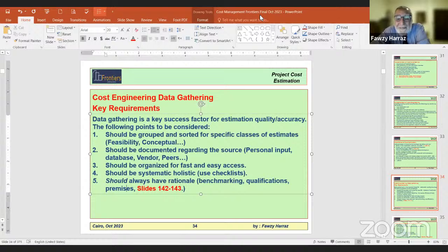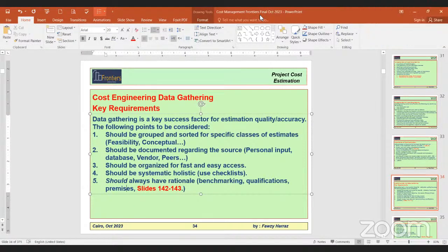So this is one way, if you put ethics aside. But if you want to stick to ethics and business conduct, you should highlight it to the consultant and owner and amend the prices. If you are at the bidding stage, the consultant and owner will share this with all the other bidders and say, please amend your commercial quotation with this item, description, quantities, and price. So there are two ways to do it.